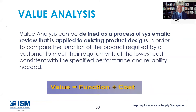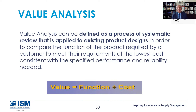Value analysis versus value engineering: value engineering is when you're on the drawing board at the design stage. The designer may not know how to manufacture efficiently, so the cost may be too high. Value analysis means the design is already ready and has gone to procurement. When procurement goes to the supplier, the supplier says: can you make a change here? The cost will come down — then they go back and change the design. Value analysis is an afterthought, value engineering is very front-end. Value is also seen as: how many functions do I get divided by cost — getting value for money.